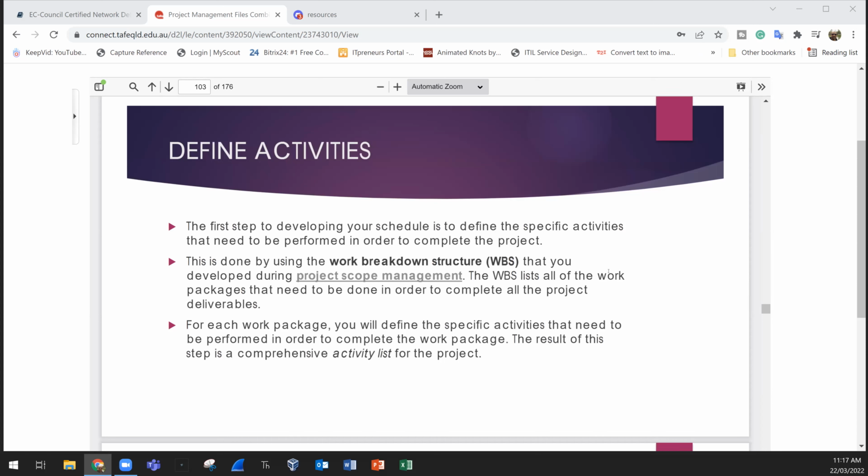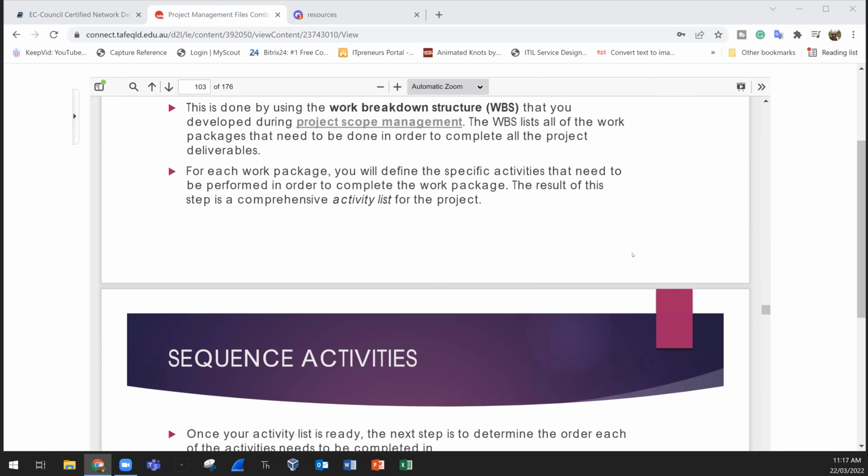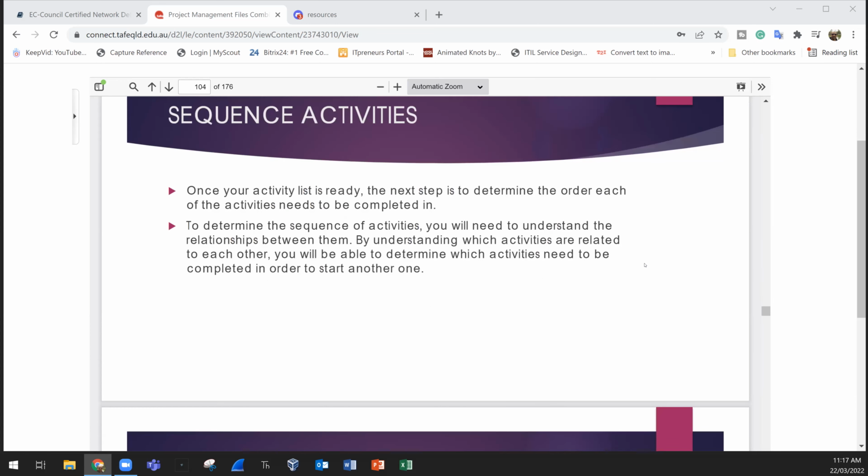And the WBS will help us to know the relationships between different tasks, sequencing the tasks, and assign resources to each task. So who is responsible, who is accountable, different resources like machines, determine the duration of each task, then we can calculate the duration for the whole project.